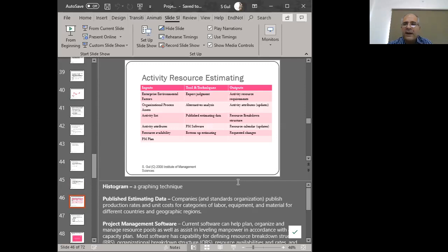As a sponsor, I would have some other contingencies, which I'm not aware of as a project manager. And the principal would have their own contingencies, which have not been shown to the sponsor, and so on down to the project manager. So there are different levels of contingencies. If the project manager exercises their contingencies and needs extra time, then they have to request the sponsor. And if the sponsor exercises their contingencies, then they have to request the principal, and so forth, right? So this level of contingencies exists, and they remain hidden from the person lower down in the hierarchy.